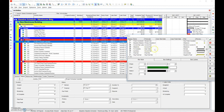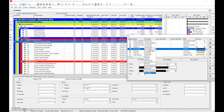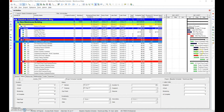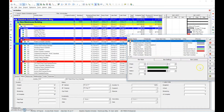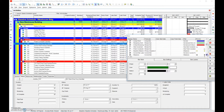I like to go to Bars and make sure I select the percent complete bar — it's a solid bar based on percent complete. You can see the actual black bar within the blue context. If we go to one that was started but is only 50% complete, the bar is shown within the green bar instead of the blue bar, because a blue bar reflects activities that have been completed. This is how I have all my bars set up in case you need to configure yours similarly — click back to the video and pause.